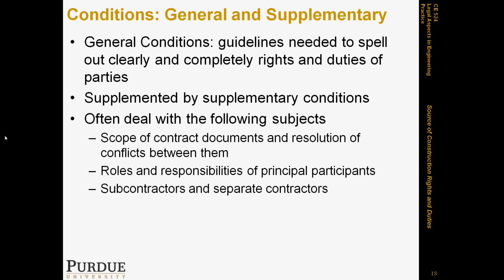How to manage subcontractors and separate contractors. The difference between a subcontractor and a separate contractor is that in some projects we have something called multiple prime contractors. So we have multiple general contractors, and the coordination between them is usually the owner's responsibility. In the case of a contractor having multiple subcontractors, it's the general contractor's responsibility to coordinate with their subs, and have their subs also cooperate with other separate contractors if needed.